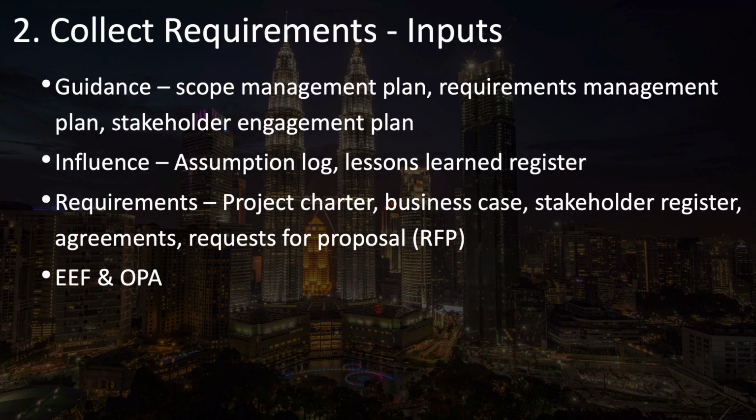Another one is the request for proposal. If you're a vendor bidding on a job, then that's the primary document that you'll use to gather these requirements. In addition, there are some enterprise environmental factors and organizational process assets that can affect your collect requirements process, and we'll get to those in the next slide.